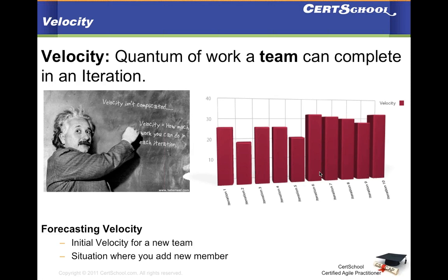Okay, so you have to factor in that commotion. How would you do that? So usually it is a good idea, from my experience, what I have seen is that if you're adding a new member or replacing a member with somebody else, you use that new person as 75% performing compared to everybody else. Okay, so you can take an average and use a 75% performance for that new team member. But it really depends on who that new member is, how you're working.